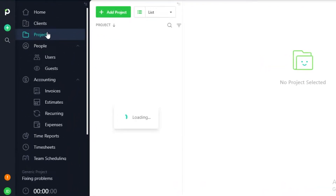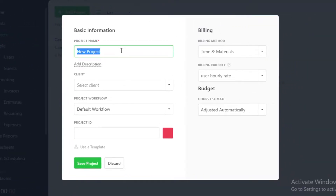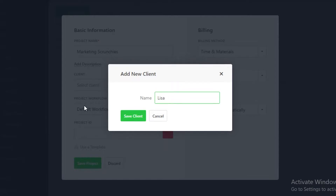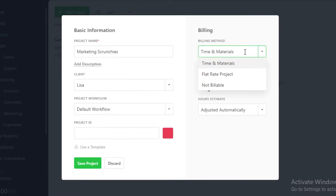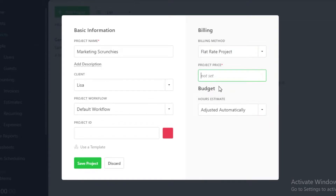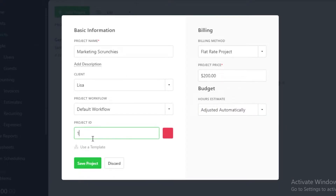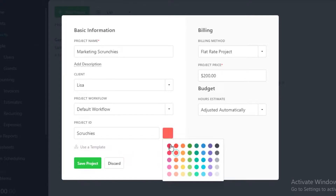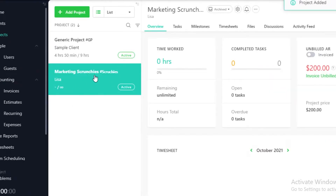Below that you have your different projects. Each project can be linked to a specific client — click on add project, add a project name like 'marketing', select your client (say, Lisa), add a project workflow such as the default workflow, choose billing type like flat rate with a project price of $200, optionally add a budget hour, add a project ID, and even choose a color. Save the project and your new project has been created.